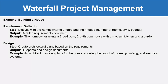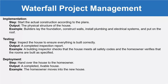Then the implementation phase begins, where we start actual construction according to the plans. The physical structure of the house is produced — for example, builders lay the foundation, construct walls, install plumbing and electrical systems, and put on the roof. Then the testing phase comes, where we inspect the house to ensure everything is built correctly and working properly. The output is a completed inspection report — a building inspector checks that the house meets all safety codes and the homeowner verifies the rooms are built as specified.